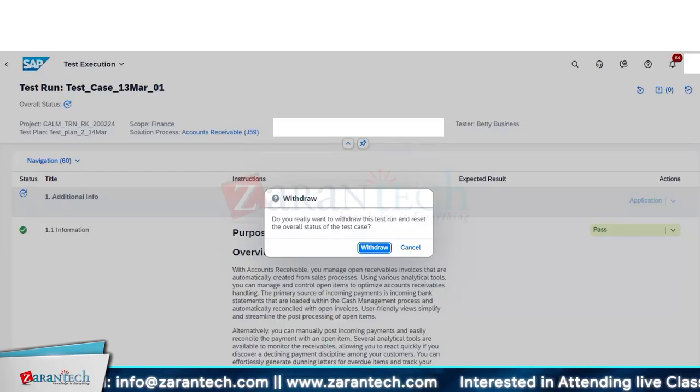So it happens that once you start a test case, you find that okay, this issue is not an error or something, but it's dependent on some other piece of code which has still not moved into the system, right? So that you cannot classify as an error or a fail, right? It is more of a dependency. More of a planning miss, where this test run should have been executed after this particular change or this particular item, right?